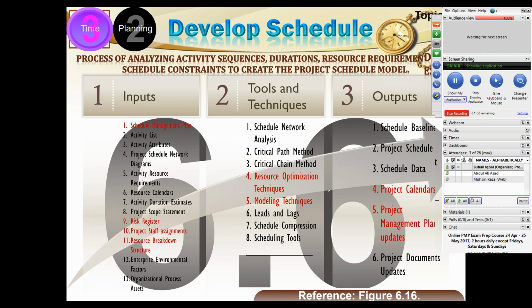So you see, we have created a mechanism by which we can protect our critical path. Now, we had many paths in our network diagram, but we are only concerned about the critical path. So all the critical activities, I asked them to contribute some time for the project buffer, and thus I have protected the critical path.